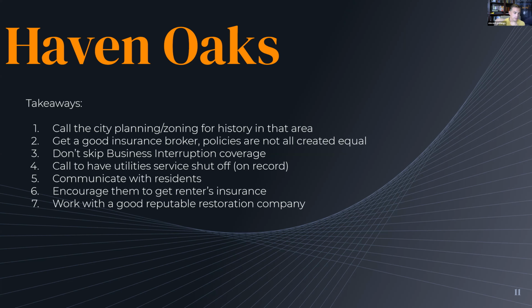But yeah, I'll obviously check FEMA maps first to see whether it's in the 100-year floodplain or near waterways and stuff like that, and what the grade is or where it's at compared to the water table, because you kind of see that. So FEMA map's really good. But then I go one step further. I call the city and say, hey, this is the area I'm looking at. Does it have any history? And I did that for this property. And yes, they said, this place flooded 10 years ago. It was pretty bad.